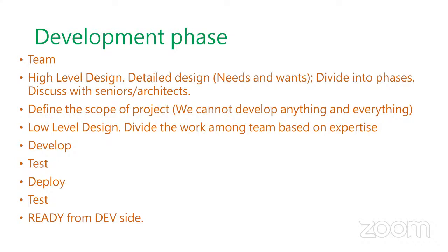When you are done with all these steps, now the development starts. You sit down, start working on each of your assigned task. So the person who is going to develop the database tables, they are the one who is going to start first. They are going to finish the database tables and give you some sample data. And the people who are working on the front end, they can just do some hard coded data and they start working. Then the backend programming comes and they are going to connect these two interfaces, the front end interface and the database interface. If you have some kind of a design diagram, that will be easy to understand.